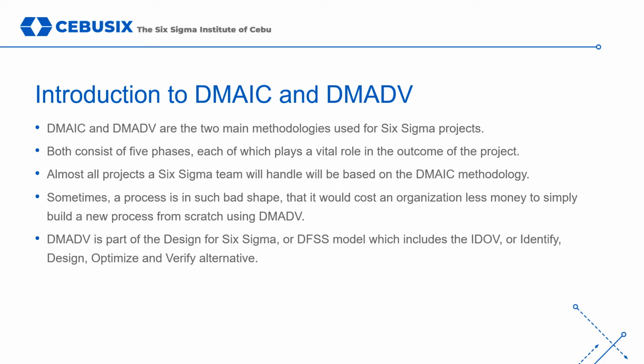Most teams go into the project knowing whether they are employing DMAIC or DMADV, but some DMAIC projects can become DMADV projects, usually during the define, measure, or analyze stages. This is when teams realize that they need a complete new process replacement. Switching to the new methodology during the middle of the project might require some shuffling of resources and could impact project schedules, which means keeping champions and sponsors informed of team progress and decisions is imperative.